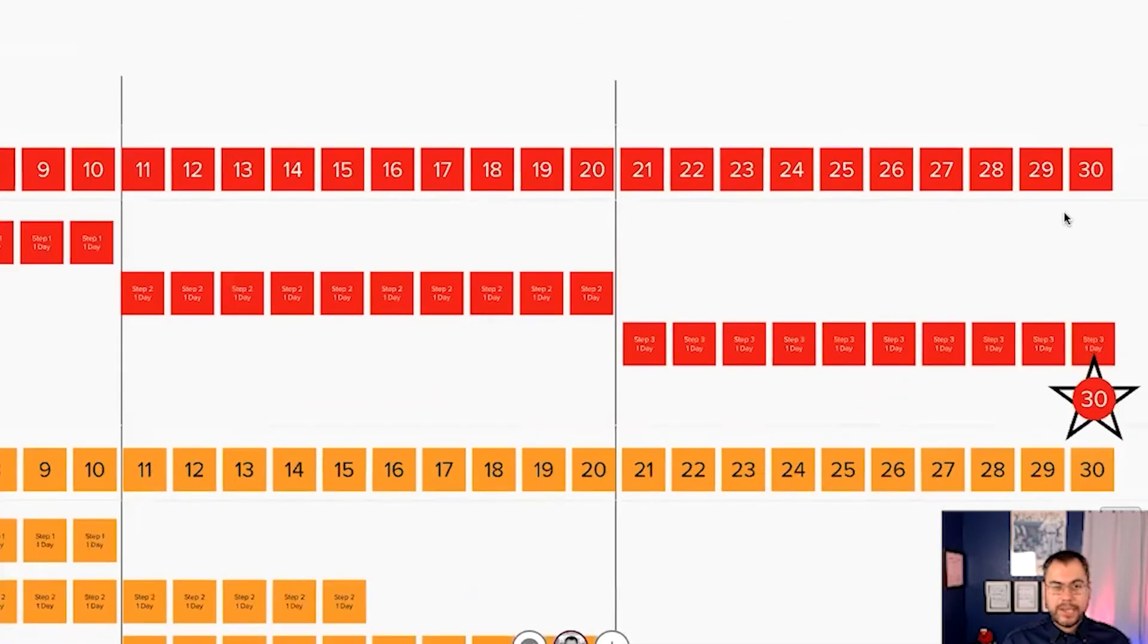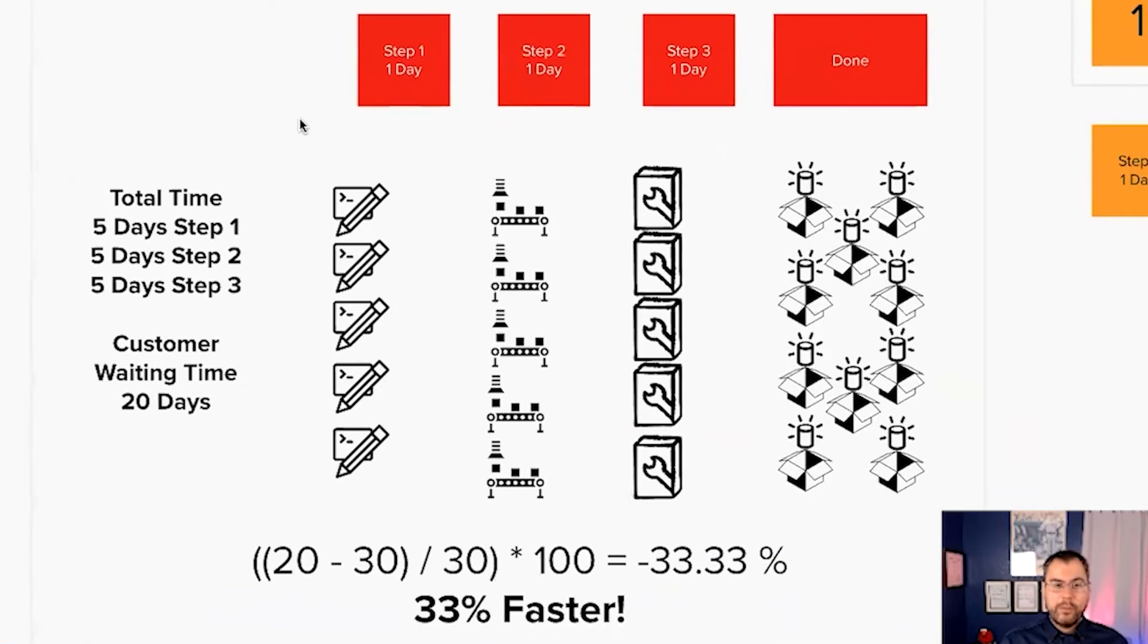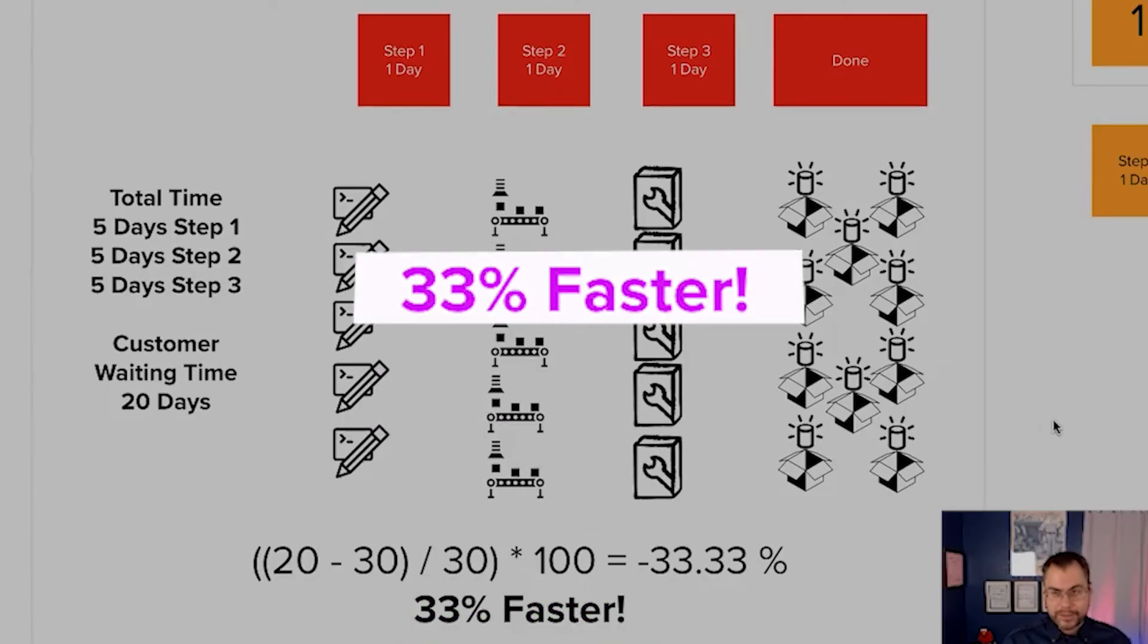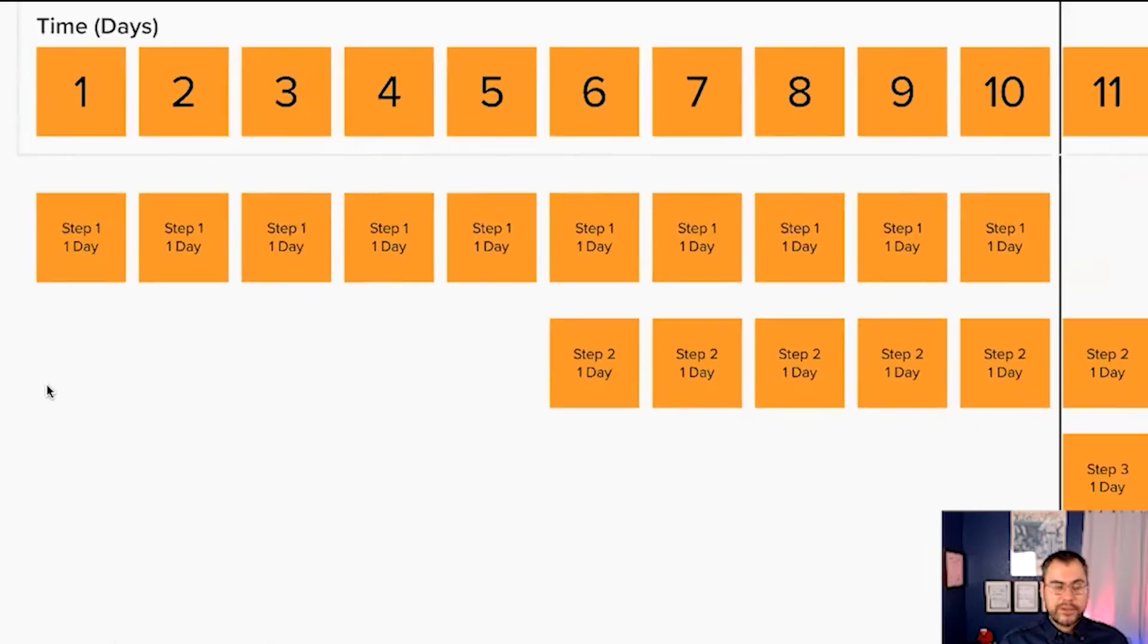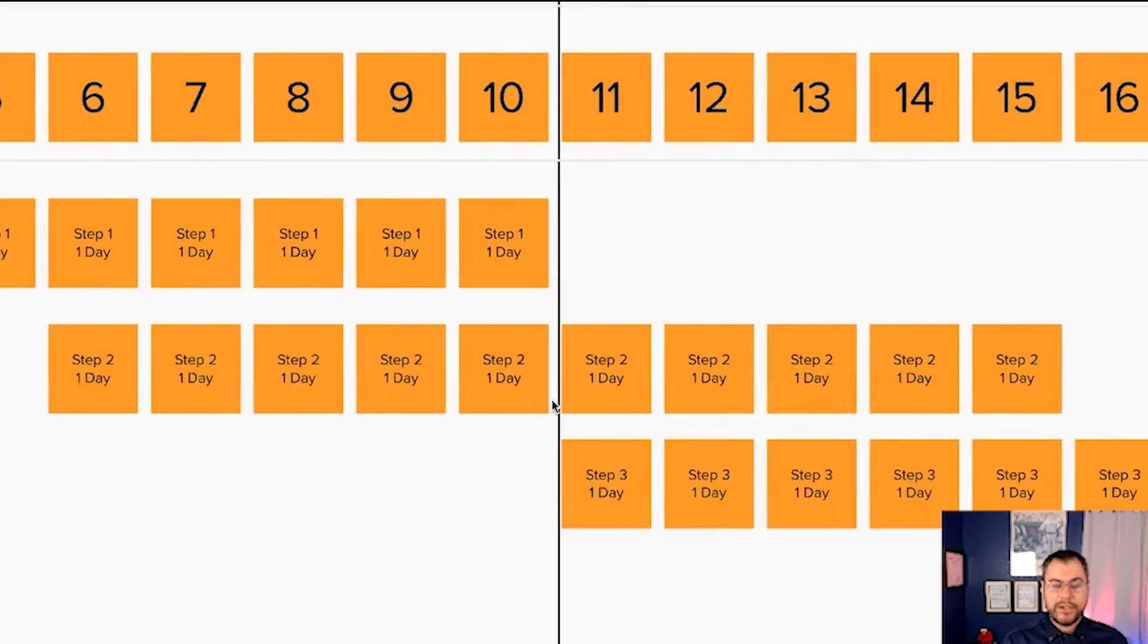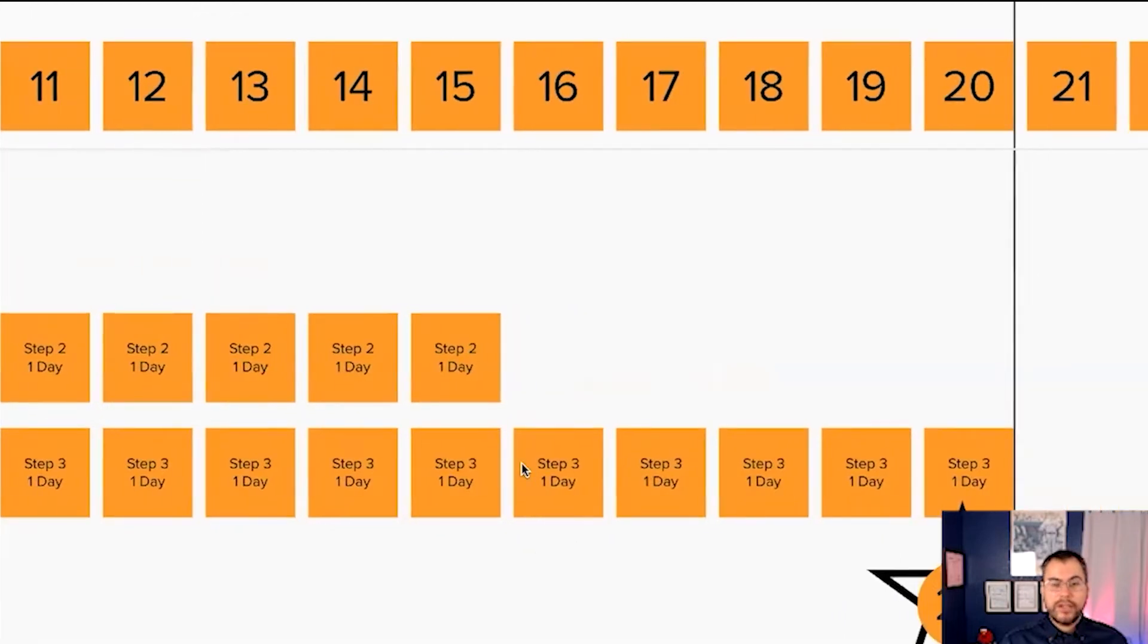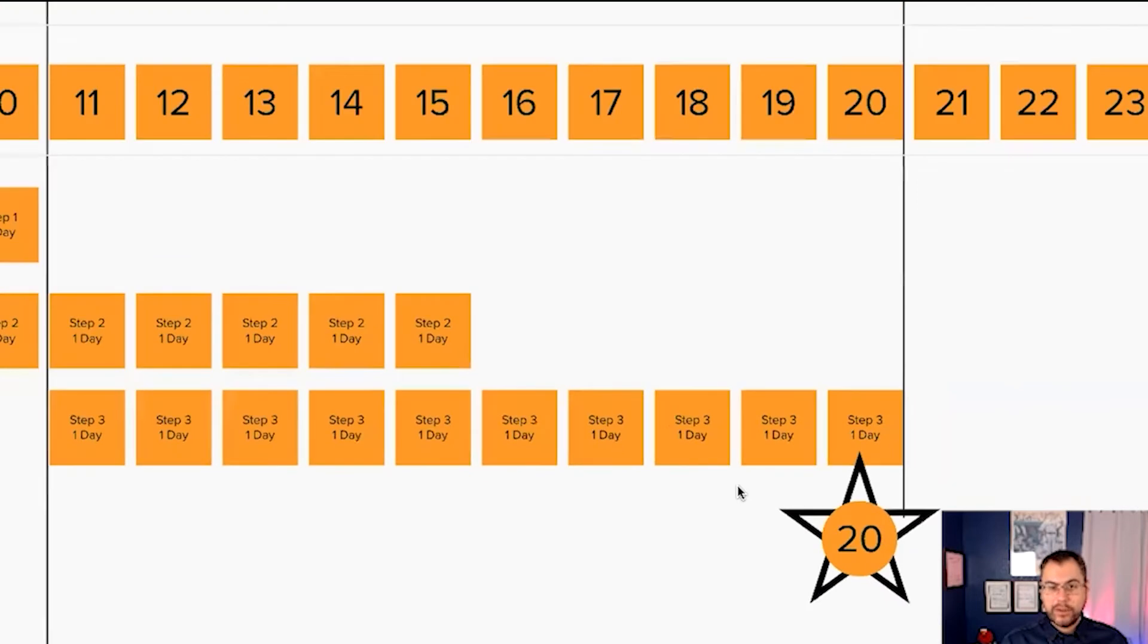Now, if I cut that in half to a batch size of five, I'm still working one single day per item. But after five days, the team working on step one hands it over to the team working on step two. And then they'll work for five days before they hand off. And the customer at the end is going to get this 33% faster for a total duration of 20 days. So step one starts to work for five days. They hand off five things to step two. You can see that they continue working on items six through 10 and they do another handoff five days later.